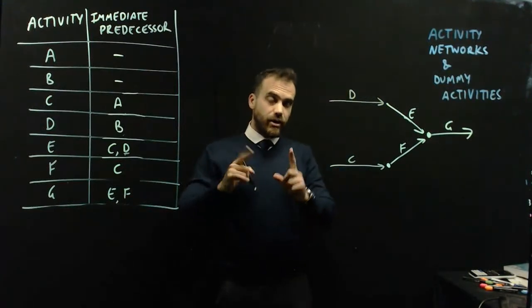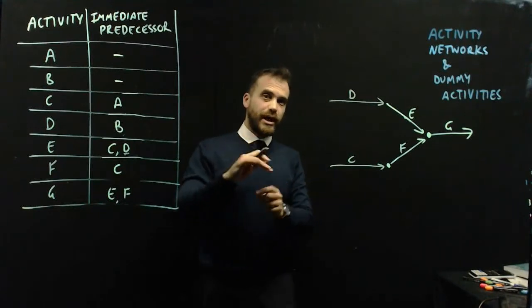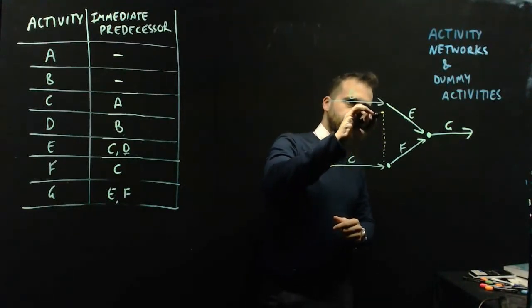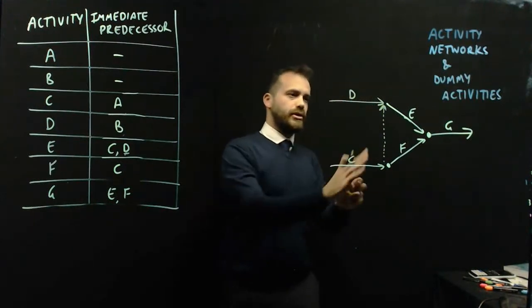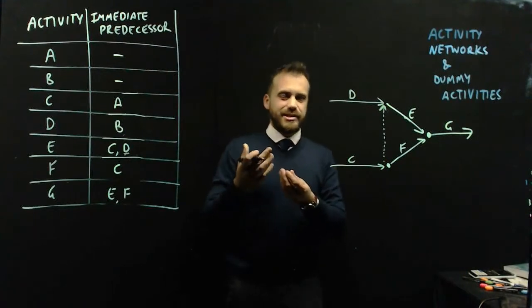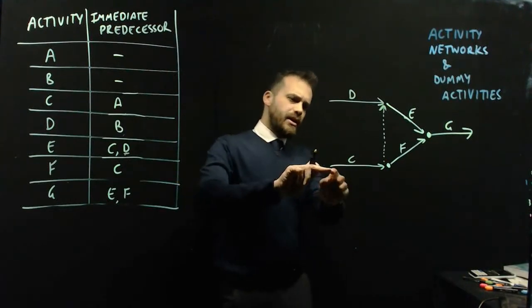And then I can draw in what's called a dummy activity using this dotted line. Now, what the dotted line, it's kind of like C in a little bit. It's saying, well, we need C as a predecessor to E.